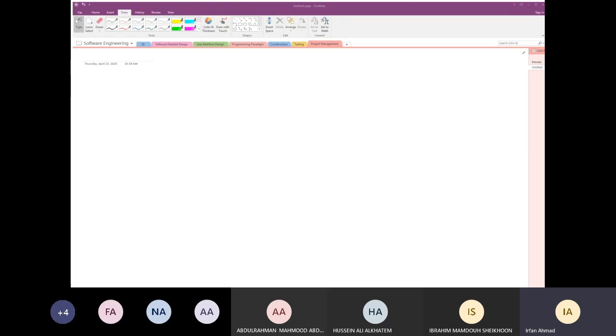So sometimes assessing the progress of the project becomes an issue, because if there's something physical like a building coming up, you can easily, clearly see what's the progress, how much has been developed, or how much has been constructed. But things which are not physical is not that easy, right? It's more about reports and documents. So the intangible nature of the project is the reason that it becomes a bit different to manage a software project.